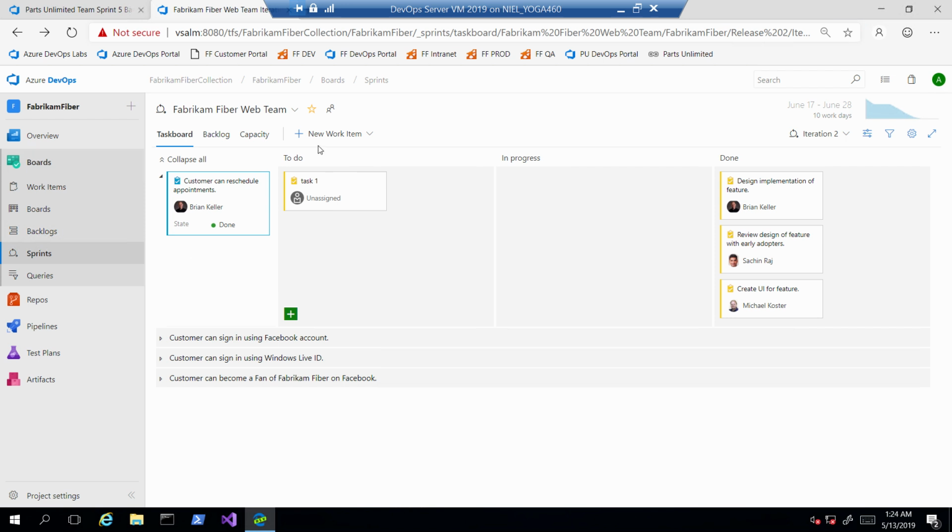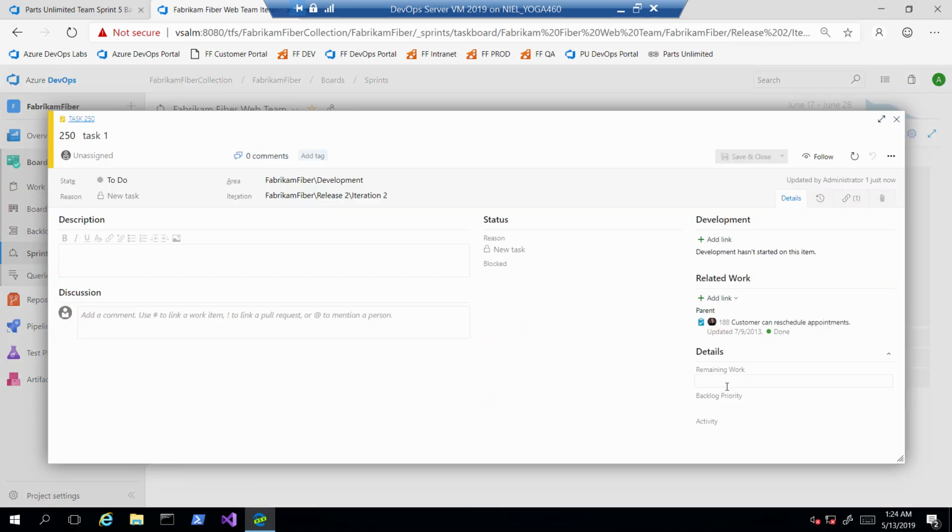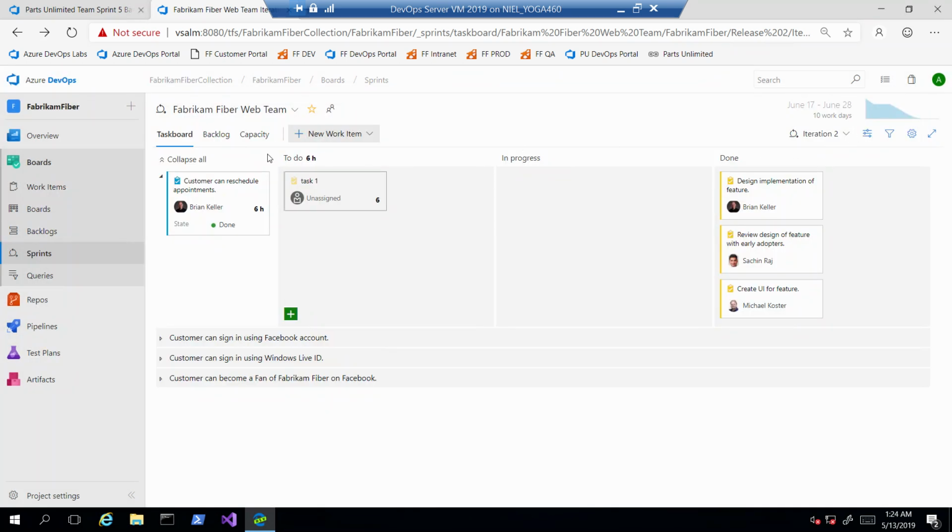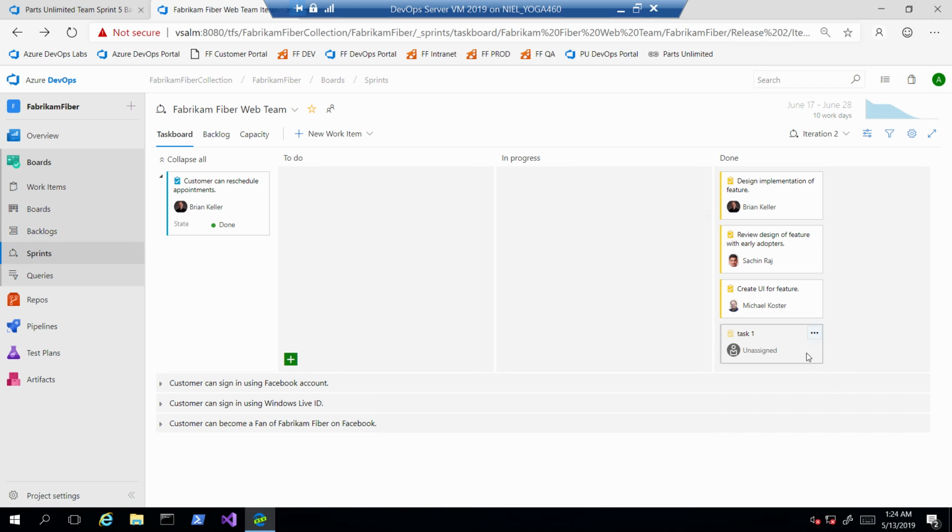Yes. So the remaining hours here, if I say 6, as we move across in progress, I can go and reduce this, do 3. Stand-up type of things. In the mornings you do stand-ups. As you're busy developing and you're updating it, you'll do it, and then as soon as you move it here, it will automatically get removed to 0, and then you're back on schedule.